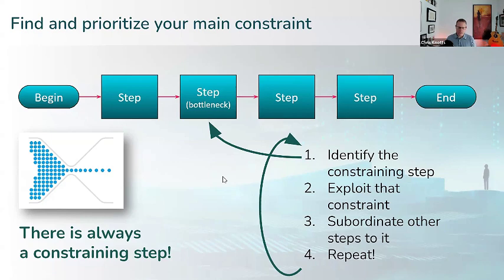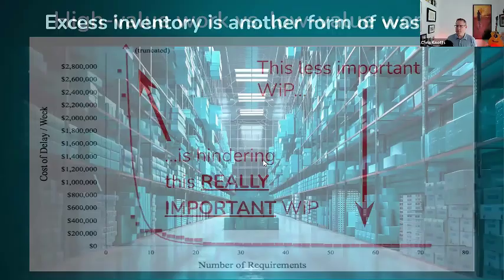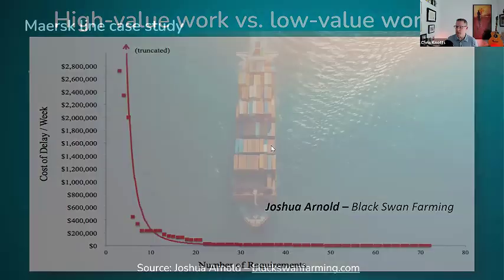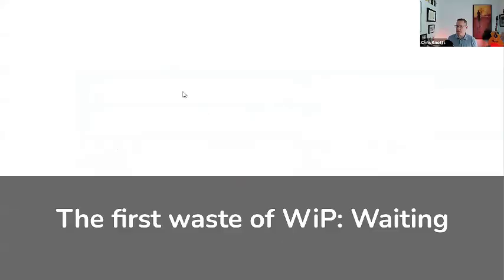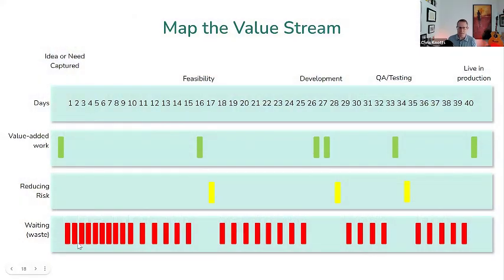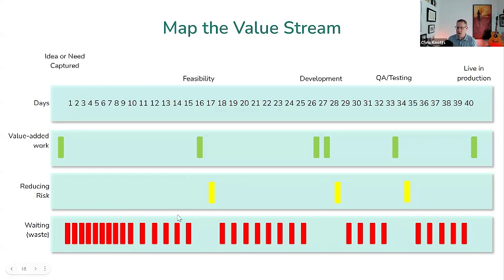Another concept to mention — not exclusively a kanban thing, but kanban can help you do this — is the Theory of Constraints. In the theory of constraints, you're looking for a bottleneck. Kanban can be a way to visualize and detect a bottleneck; value stream mapping is another good way. Going back to the value stream illustration: we can see multiple bottlenecks — in the feasibility study stage where everything else is stacked up waiting, in development, in QA. With the fuzzy front end in particular, there are lots of ideas and valuable potential things to build, but the studying and approval process is the bottleneck.